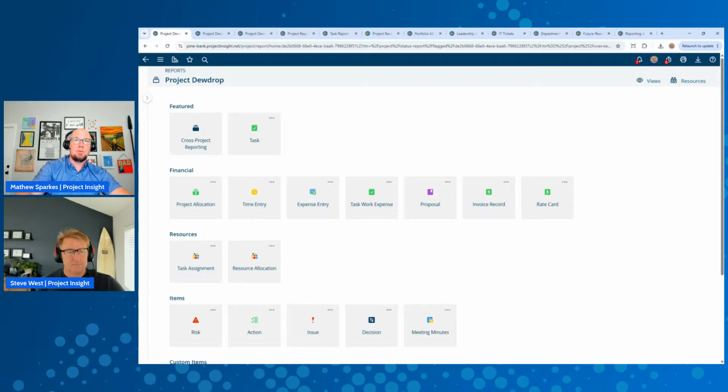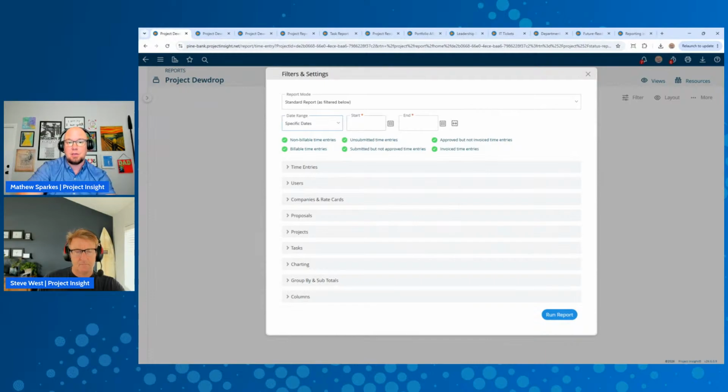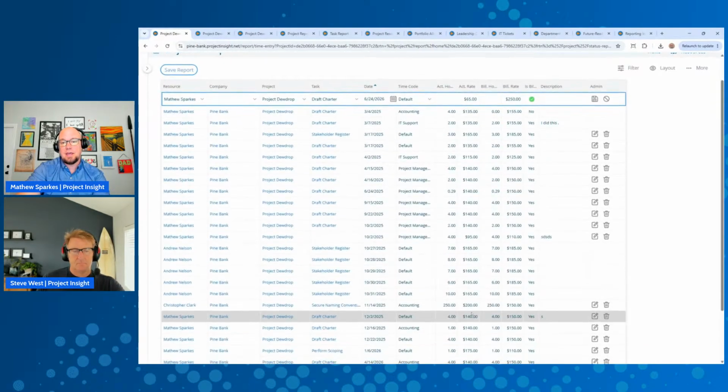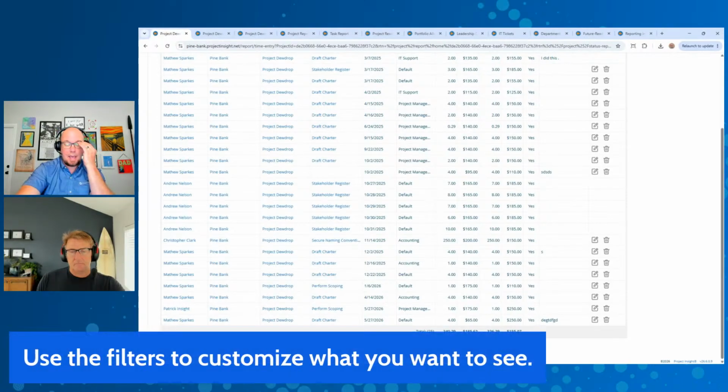In this particular instance, everything I look at is going to be through the lens of my particular project. So if Steve says something to me like, "Hey Matthew, I need to know how many hours have been entered on your project," while I could have seen that on the task list in the format we were just doing, I can come in here and say, "Hey, generate a report off of the time that's been entered." I can change the dates, where I can say, it's going to be these specific dates. I can use rolling dates, which is what I'm going to use right now, where I'm going to say, show me the last 15 months worth. And then I'm going to just quickly run this report, and it's going to show me all the time that's been entered against my project, where I can then happily tell Steve, hey, it's been 340 hours.